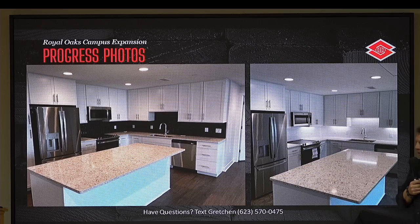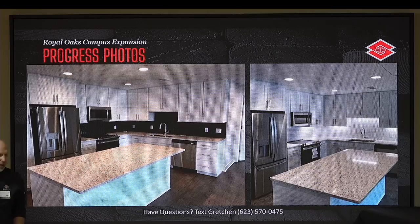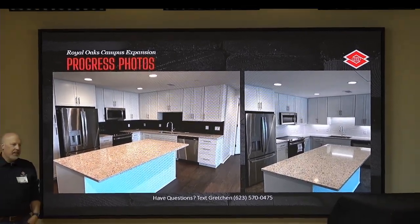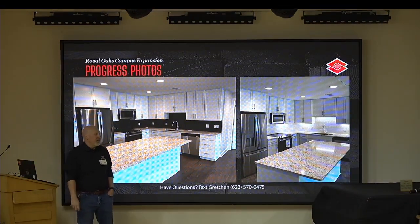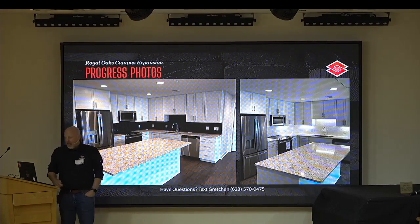That's holding us up. So we've found some other parts on the project, and we're stealing that chip out of another area because that's what we do. We rob Peter to pay Paul all the time. That's right. So Paul's getting a new chip in it right now. Yep. And we're working on the doors currently to get these things taken care of. Yeah, that chip was en route this morning when I talked to those guys on my way out here. So that's the last thing over there. We're pretty excited about that building.